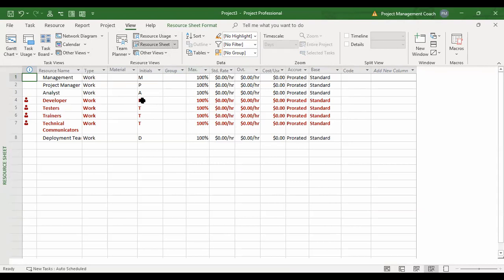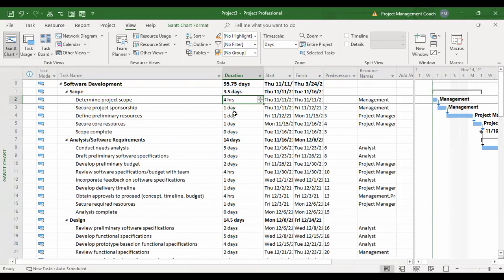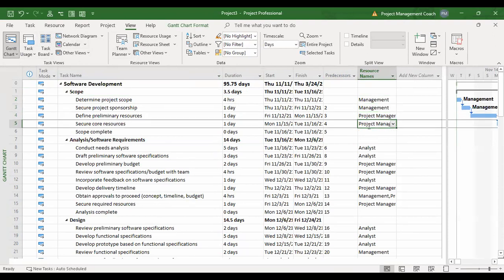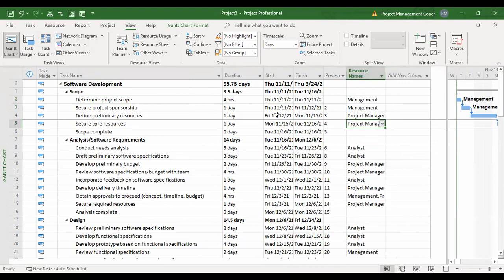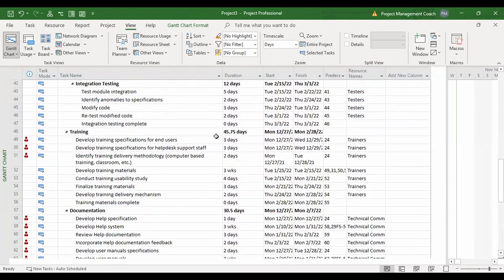Think about what the overtime will cost, come in here and populate it. And if you're a very skilled user using Microsoft Project, it will do everything for you. It will base the estimates on how many hours those individuals are working. As you can see here, we have resource names. So if you follow it step by step, methodically, sensibly, calculating and estimating based on the hours each resource is working, you'll arrive at an estimate.